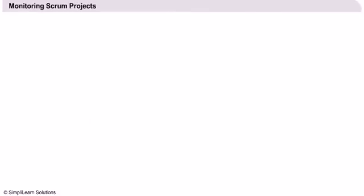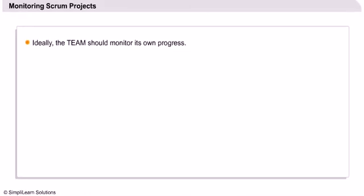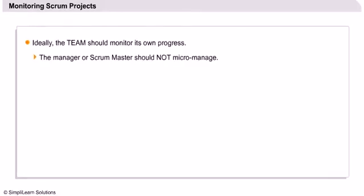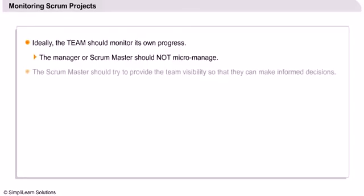Let us establish some common ground before diving into techniques or measures to monitor Scrum projects. First of all, it is important to understand that in Scrum, the team should ideally be managing its own progress. The Scrum master or the manager should not try to micromanage the team or interfere with this process. That said, the Scrum master should try to provide visibility to the team about progress or lack of it, so that the team can make its own decisions.